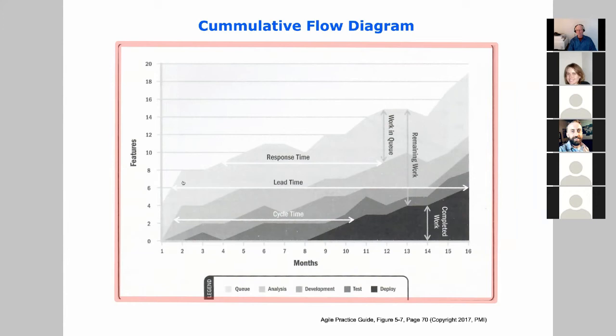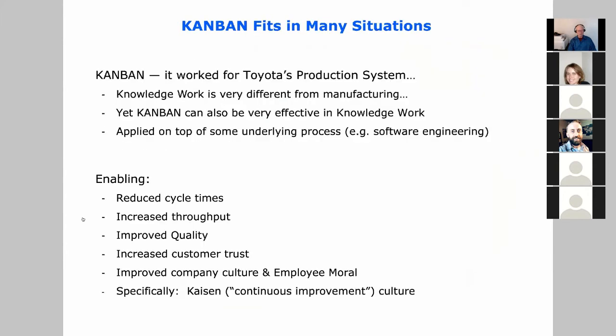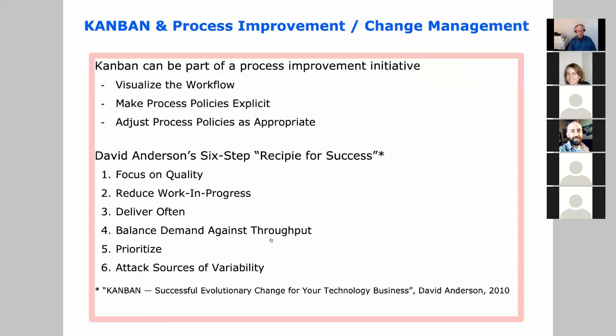And so you throttle the input. You say, this is how much I'm able to produce. Until you give me more resources and I can produce more, I'm only going to allow in 5 user stories of input. So that's what's meant by balancing your input with your output or throughput.